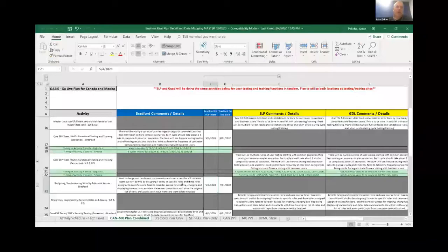Once we have that, we already have the security, we have the cutover plan for when we are going to convert the data over, and all the testing. The gap is, Ryan, we have all the business scenarios, right? We just took the business scenarios and broke them up into cycle 1, cycle 2, cycle 3, cycle 4, cycle 5. Make sense? That needs to be communicated at a high level, so everyone knows, okay, this we are going to test at this point of time, this we are going to train at this point of time.